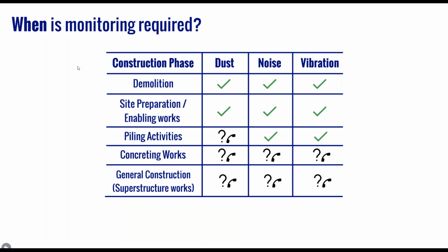I'll end this section with a short video clip which shows an example of driven piling technique that's been carried out on a site in the centre of Slough, which was constrained on all but one side by surrounding residential and commercial uses. Despite the fact that very high levels of noise and perceptible vibration were generated by the works, there was only one complaint raised throughout that we were made aware of. The developer successfully resolved this by agreeing to place the affected person in temporary office accommodation so that they can continue to complete the work over the 2-week period.